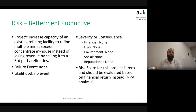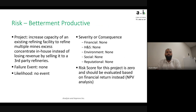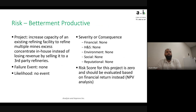Now a betterment productive project: we're trying to increase the capacity of an existing refinery facility instead of selling the concentrate to a third party. Failure event: there is none — there is actually no risk to the business right now. No likelihood, no consequences, risk score is zero. This project must be evaluated entirely on the positive impact of its financial return — in this case NPV — which is probably good enough to justify looking at the project itself.